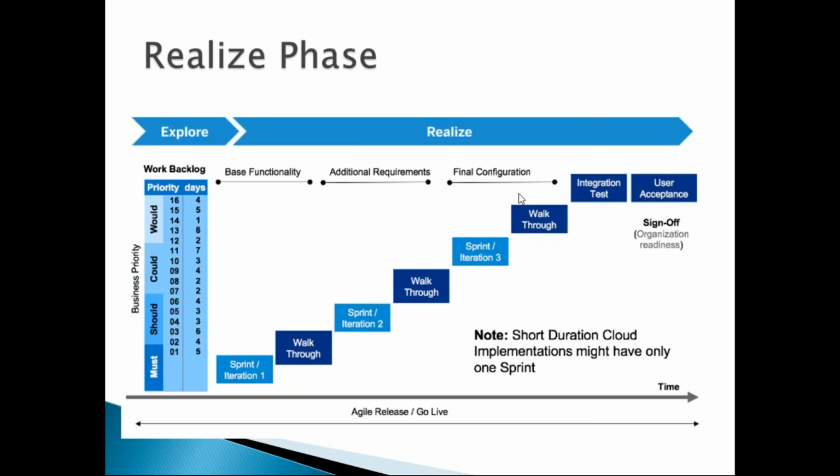That is where we go for the final walkthrough of the product. So once all this is done, then is where we start releasing the product for testing. That might be user aided testing, integration testing, automation testing, whatever is to be done, we do it here in this place. So both configurations and even testing will all be done over here in the realize phase.